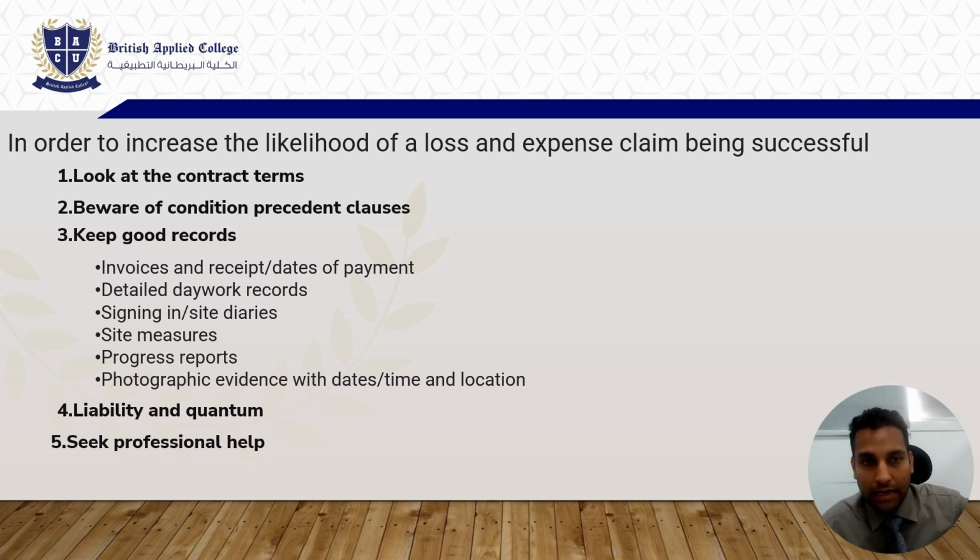You also need to keep good records, meaning you need to keep every single expense documented, because no one will pay you back if you don't have any records of it. At the end of the month, if you say we have, say, 10,000 dirhams of expenses which we were not expecting, how will you claim that? You need to have the bills. So you need to keep all the bills and good records of them. That is the basic thing.